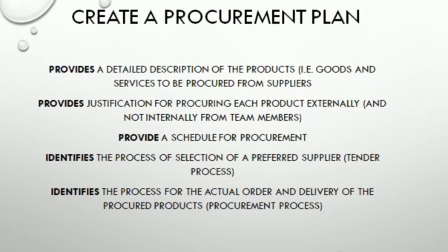Then identify the process for actual order and delivery of the procured products. Now maybe you and the supplier can agree that, okay, if you need a material, you have to inform me 2 days before the time for effective delivery. Also put all those things into consideration in the course of your project plan.